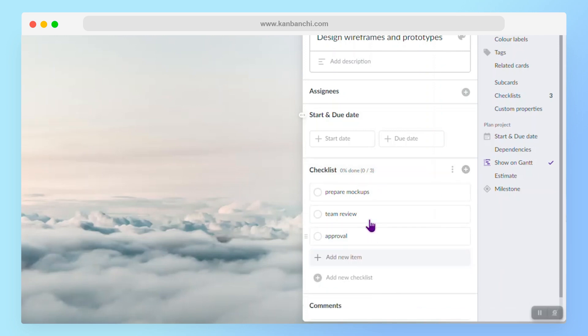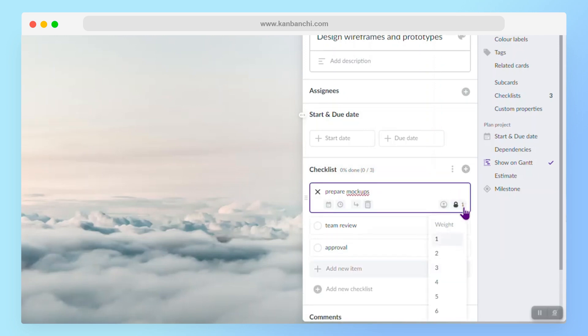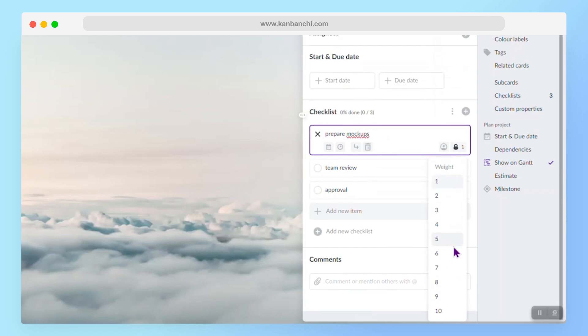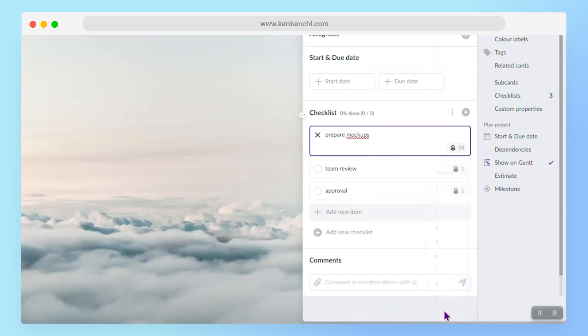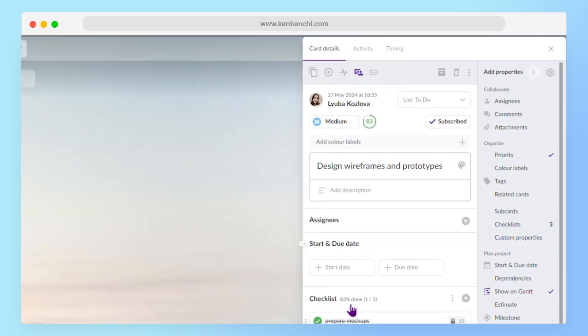Also, I can identify the weight of each of the items just to make sure that the team understands what should be done in the first place. And the progress of this card will be calculated accordingly. So you see this progress is 83 now.